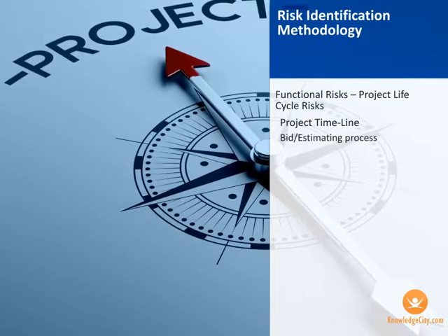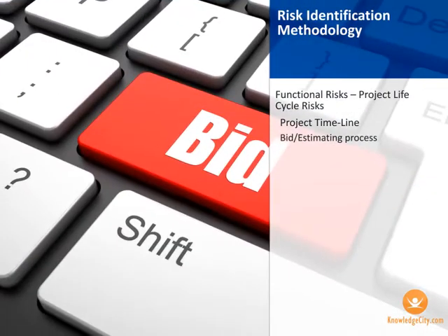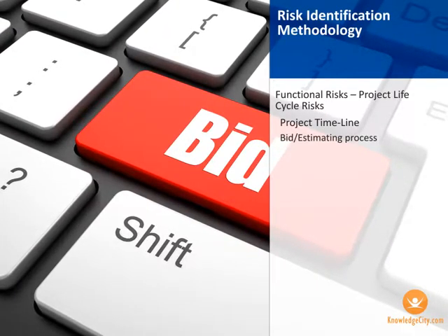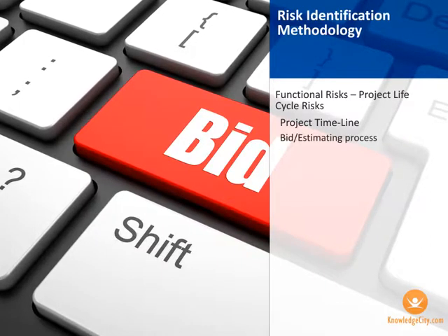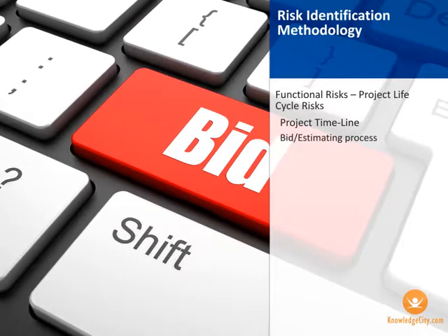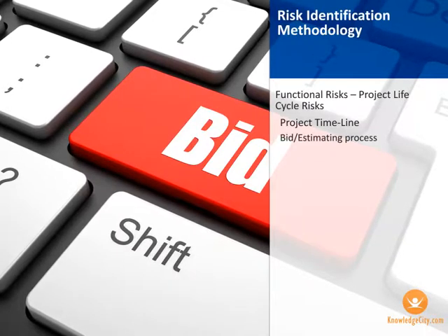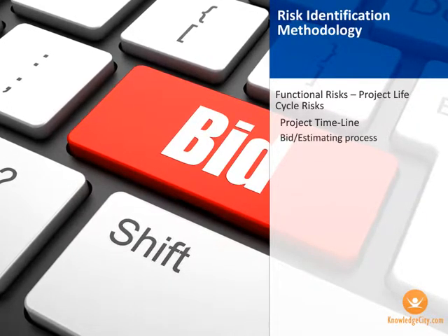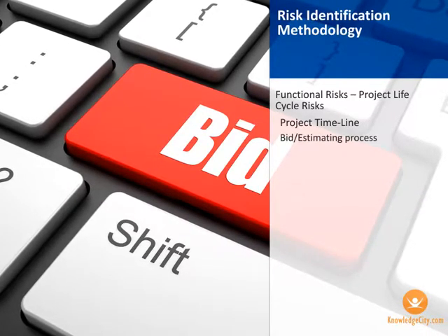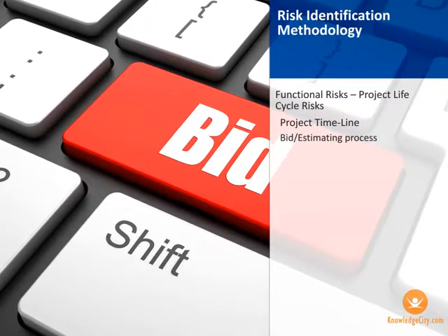In the bid and estimating phase, pricing must take into consideration potentials that at various points in time require a contingency mindset, and part of the costing to build in these factors. As discussed previously, in an outdoor construction project, if you don't account for rain delays, then your timeline can be considerably longer than anticipated. Contractual obligations and commitments can also result in compliance risks in addition to delays, extra costs, up to and including the possibility of cessation of work and awarding to another contractor, or worse, penalties.